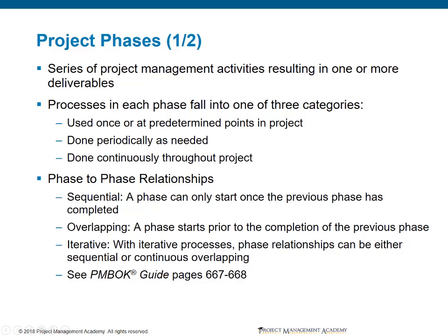For example, if we're conducting a feasibility study, and that feasibility study is about 80% complete, and it looks like we're going to have a favorable result, we may be able to start the following phase a little bit early by contracting with a real estate firm to purchase the land, an architect to go ahead and start designing the structure. This doesn't mean that we're buying anything yet, we're just getting the ball rolling. This allows us to get a little bit of a head start.